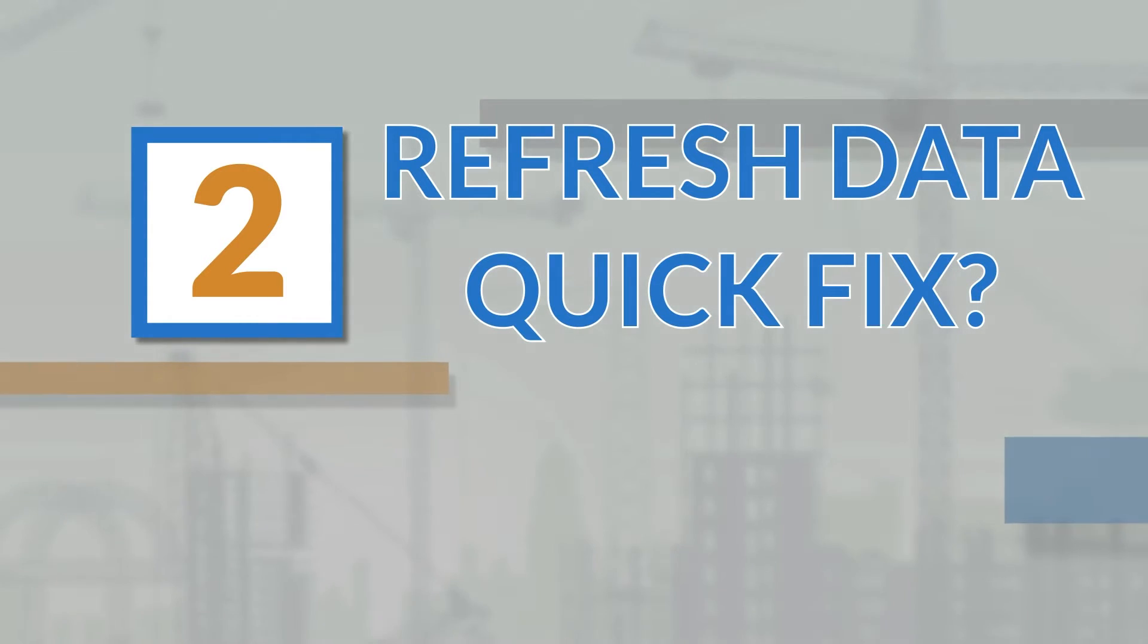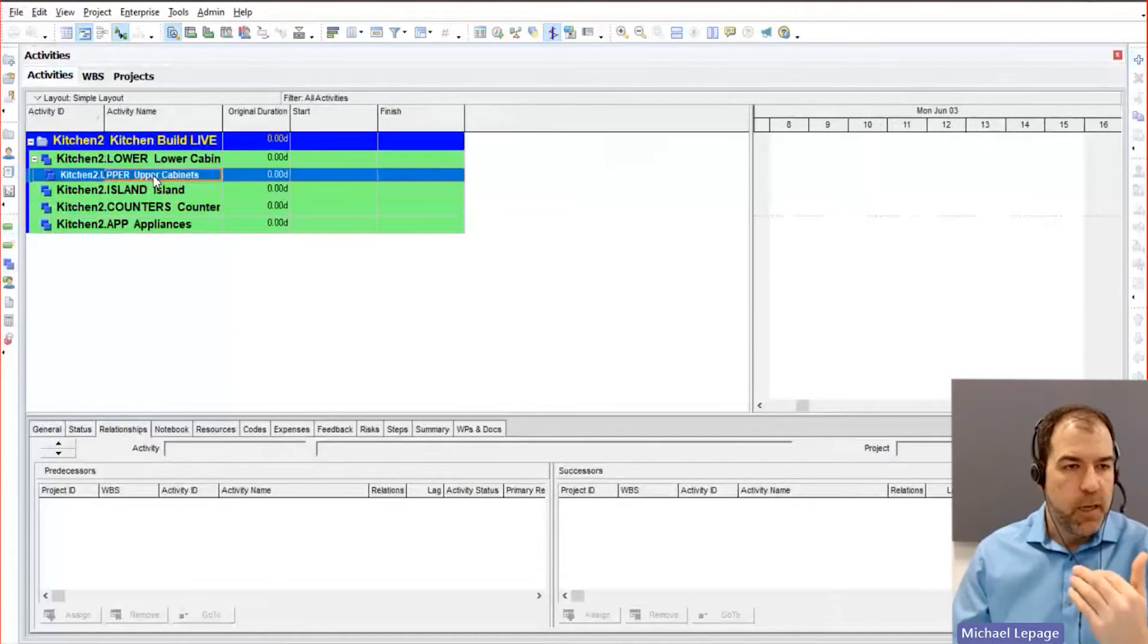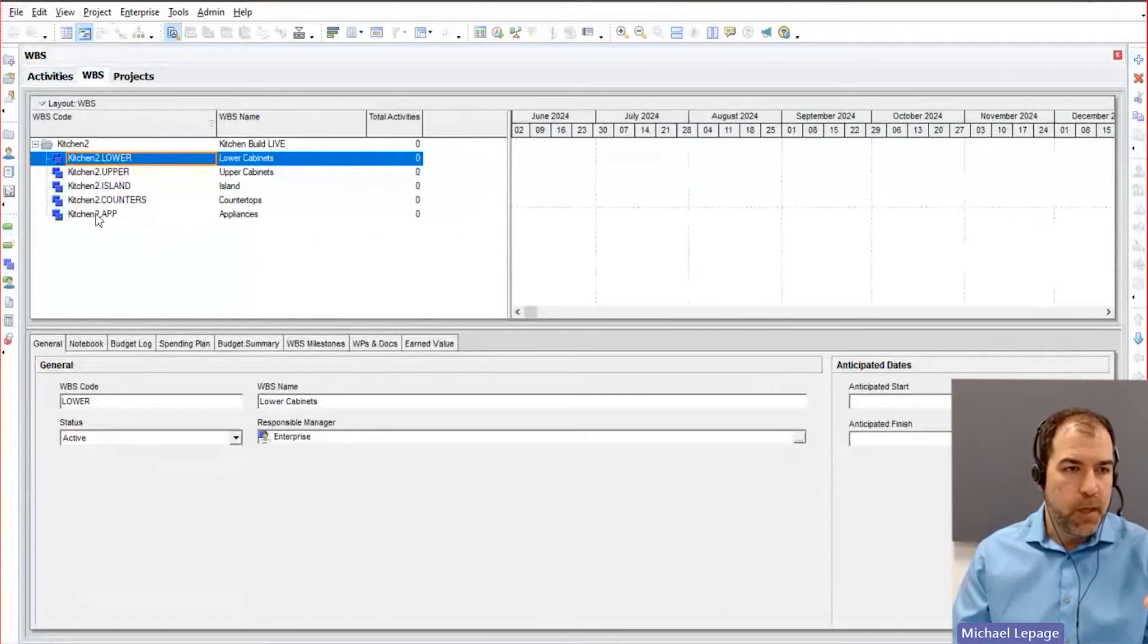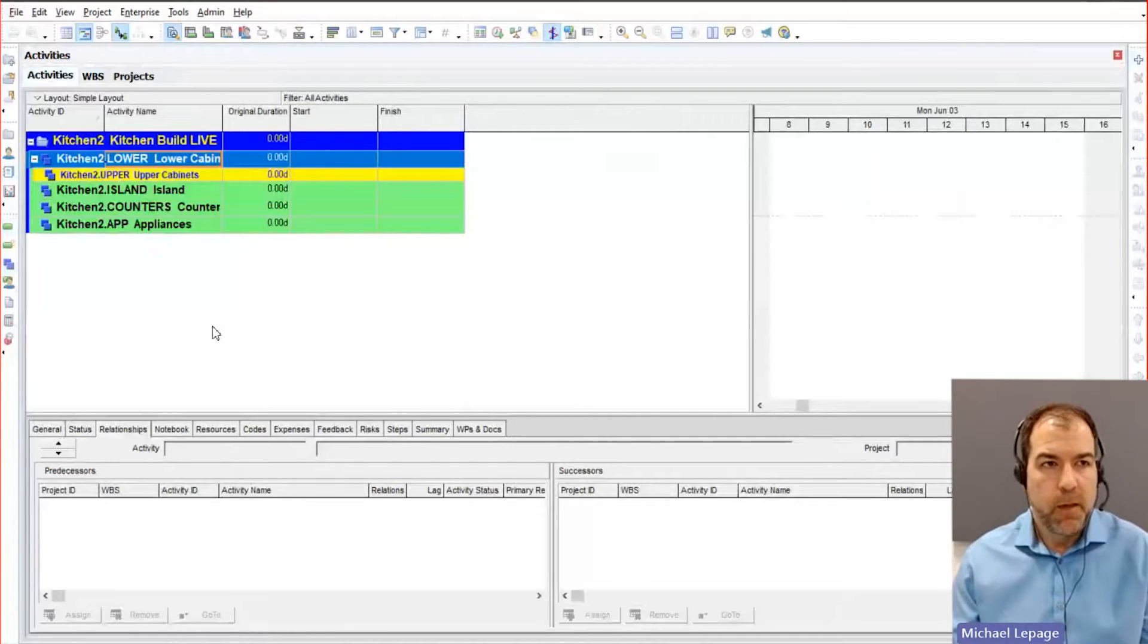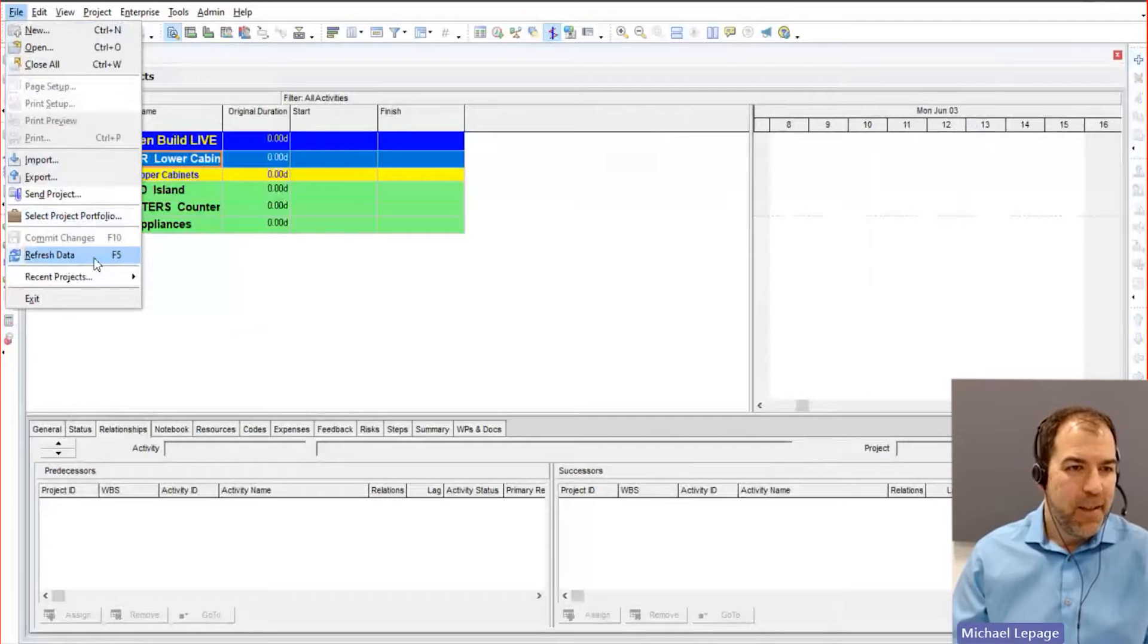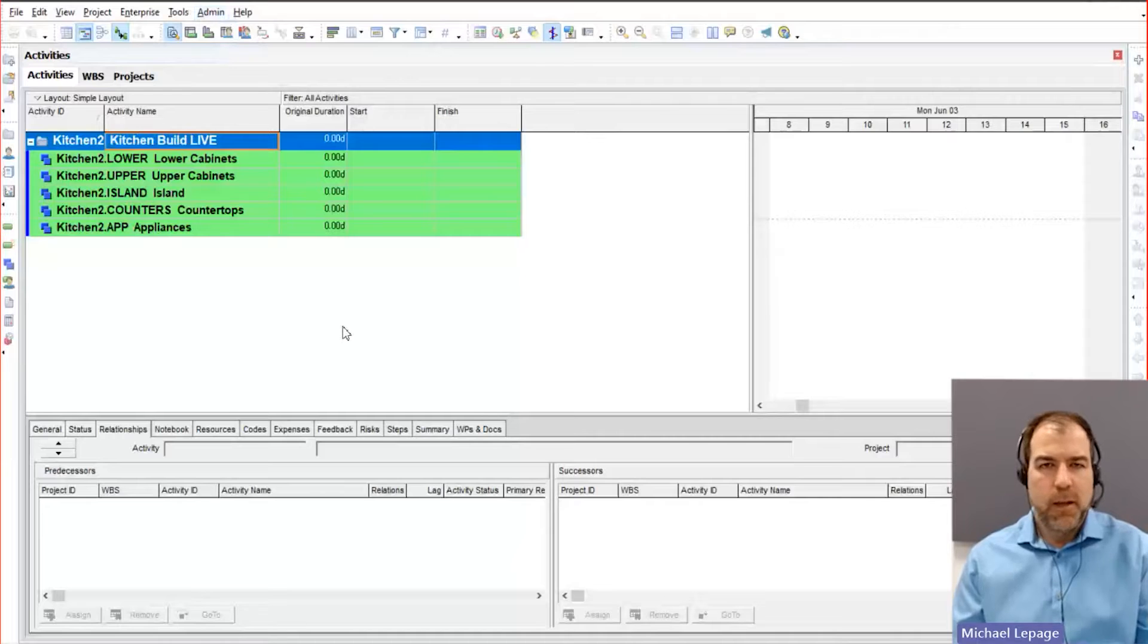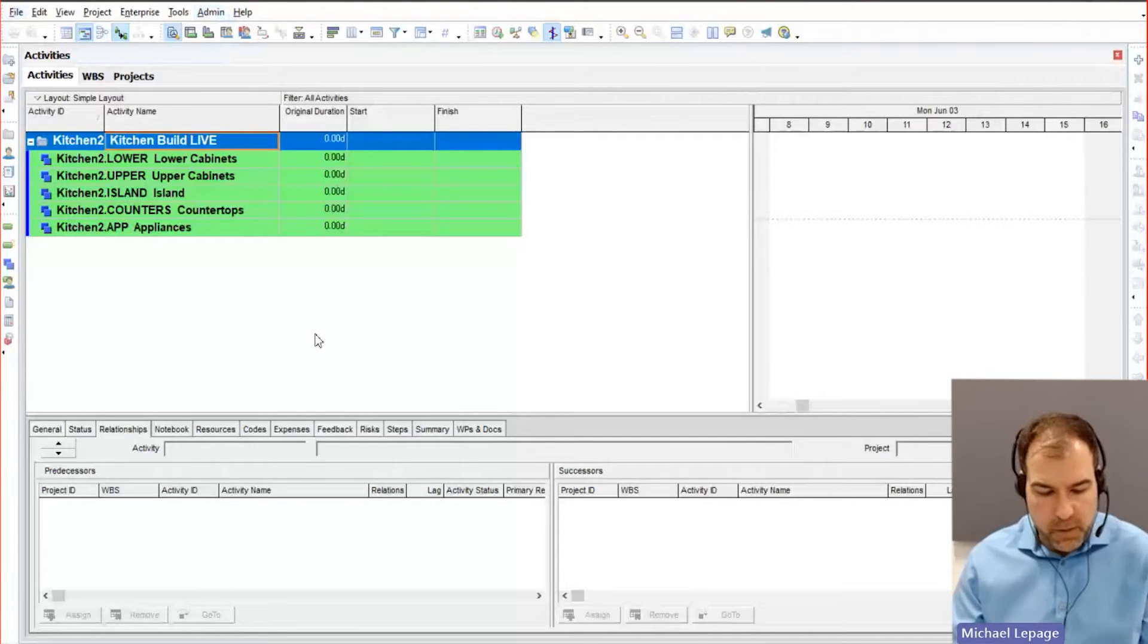Now here's another bit of a weird thing that happens with P6. Look at my screen for a moment. You'll notice I have lower cabinets and then upper cabinets seems like it actually is a sub node underneath, but I know that it's not. There's a disconnect between what's showing on this screen and what I created on my WBS screen. So once in a while this happens and there's a quick fix for it. You just tell P6 to refresh the data. You can do that either from the file menu, refresh data, or you can hit F5. When I refresh the data, it fixes that sub node. So I don't actually have a sub node. I just have all these green guys. So that's a little trick. If you ever feel like something's not looking right, if you worked on a different screen and came back and something's not quite right, you can hit F5 or file refresh data to get things looking good again.